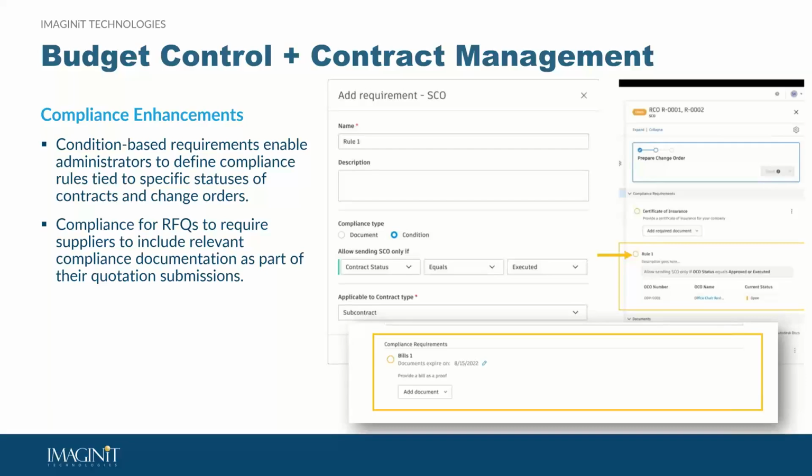And this is super important because with this new workflow, we're reducing risk and we're also standardizing your overall processes. If we make compliance checks part of the workflow, you're going to prevent work from moving forward until the correct documentation has actually been put in place. And you're also going to improve quality workflow, which is going to make sure that every supplier is meeting your company's or your client's standards. And I think that's super important.